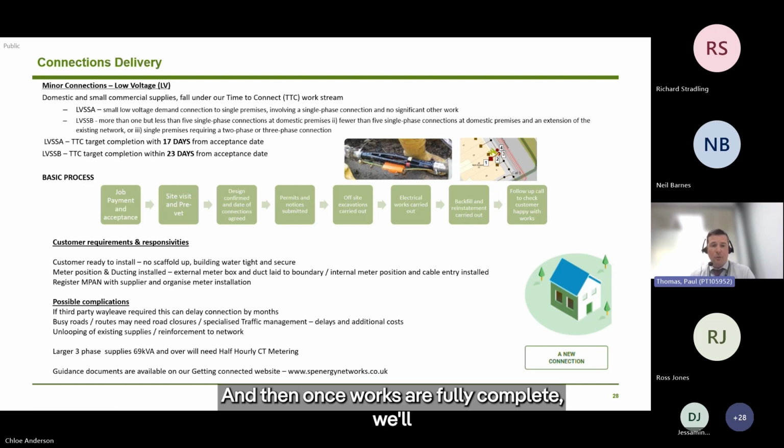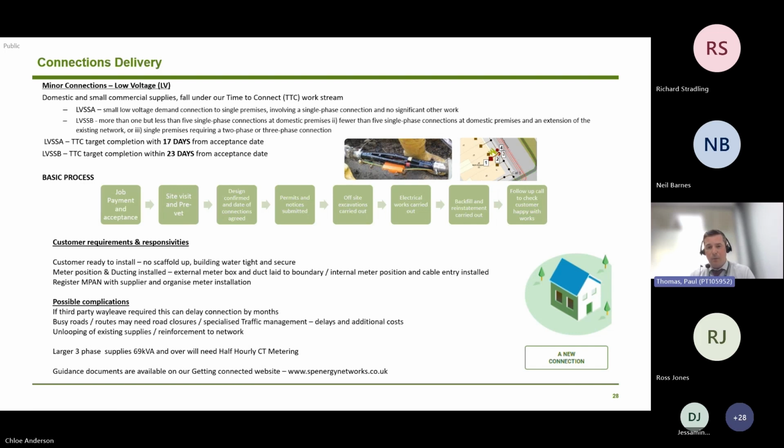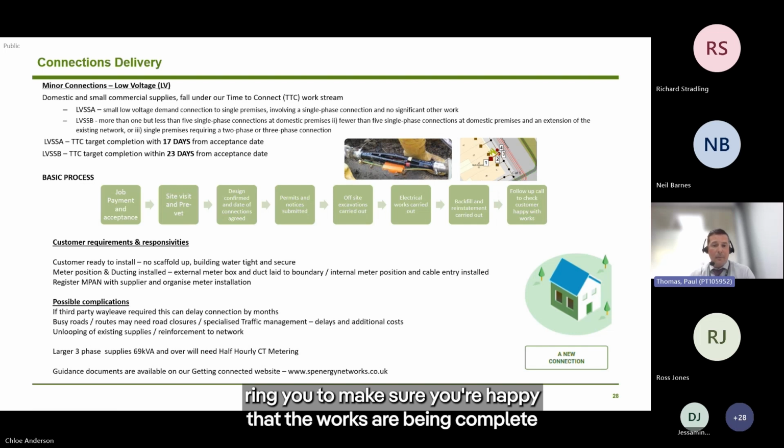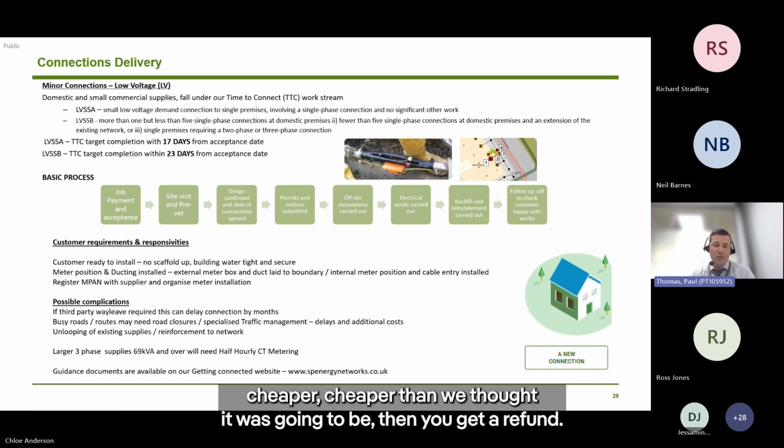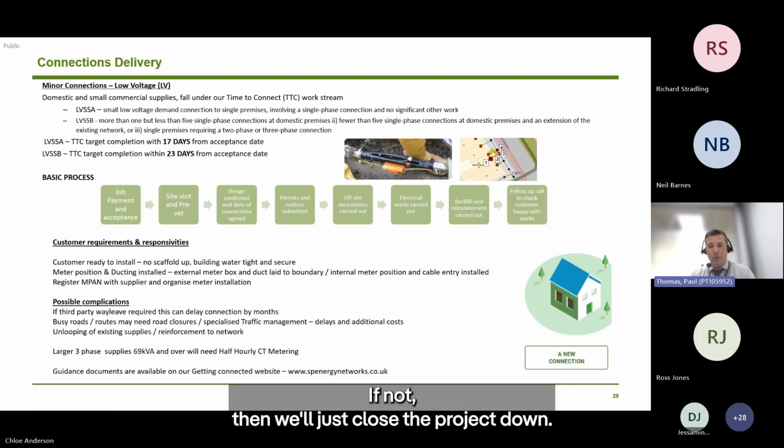And then once works are fully complete, we'll ring you to make sure you're happy that the works have been completed to your satisfaction and there's nothing outstanding. Then from that, we'll close down the project. If we manage to do the project cheaper than we thought it was going to be, then you'll get a refund. If not, then we'll just close the project down.